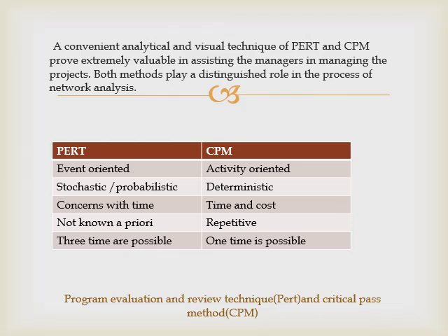Summarizing, the main characteristics of PERT: first, event-oriented. Stochastic or probabilistic, not deterministic, because of the lack of information and data. Concerned with time, not known a priori. Three times are possible.